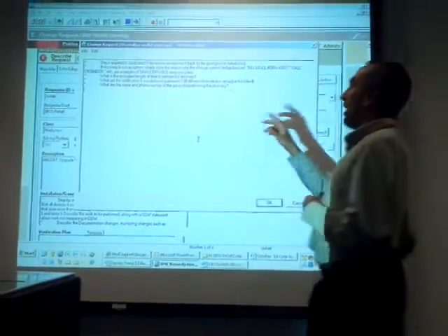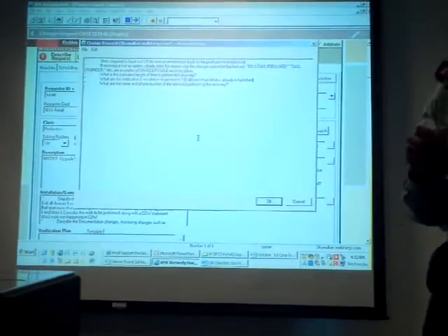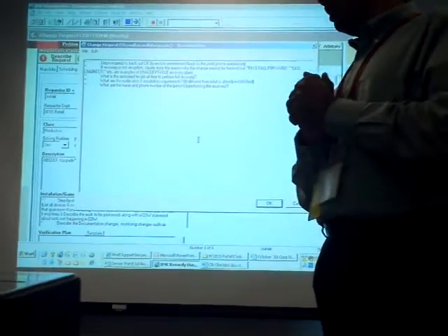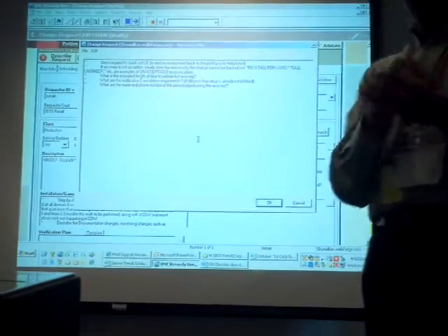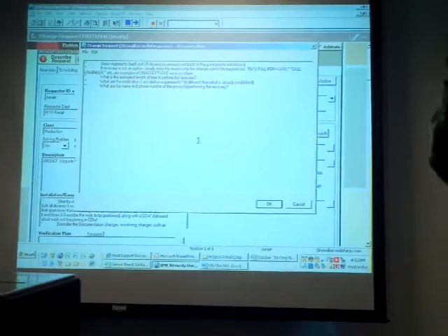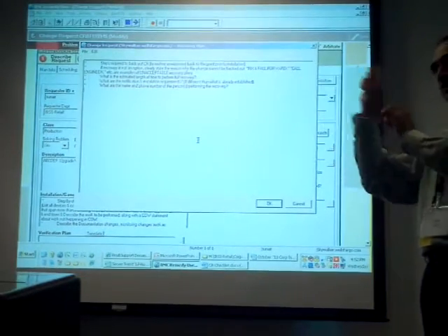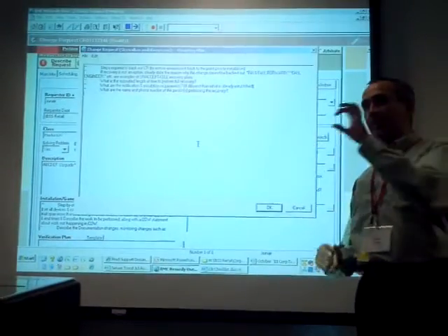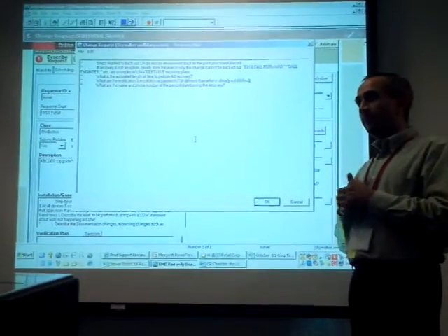But we always indicate application team functionality will be recovered, tested, and verified by the application team. Capture that. You don't want to be held accountable for validating or recovering the application. So you always state recovery of the operating system or the change will be performed by SMNC Windows, or indicate a name and a contact number if you're going to be tied to it, and also indicate application recovery will be performed by the app team, and name that application team.